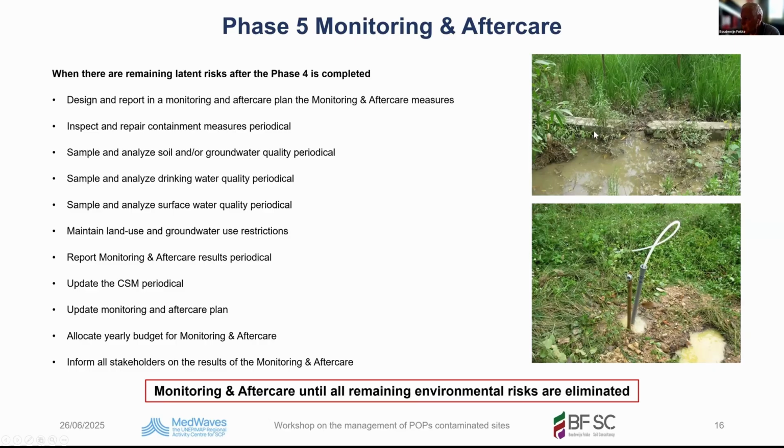But the climate here is, in the rainy season, heavy rains, and the neighboring people want to get rid of their excess rainwater, and they just open this wall to allow their backyard to be drained off through the contaminated soil. With this, the migration of contaminant was enhanced. So this, of course, was repaired, and the mistake was that the people were not informed properly on what should be done and what should not be done. Plus, if you do such containment, you should take care of the problems originating from the implementation of your measures. Okay, so inspect and repair.